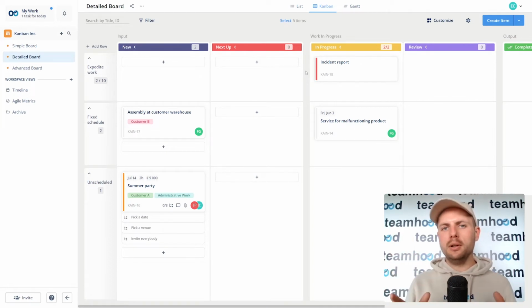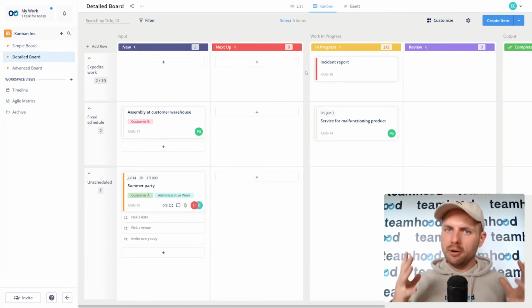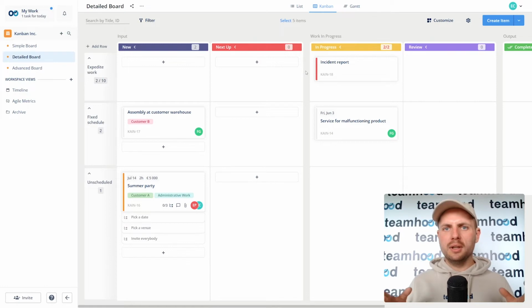So you should model your process this way: if there is a planning or prioritization stage, items should still be able to travel back and forth. But once you have prioritized something and committed to doing it, and you move it to work in progress, that's kind of it. You have elected a very important task. It requires to be finished. Unless there are some dependencies or impediments, you should not keep pushing it back.